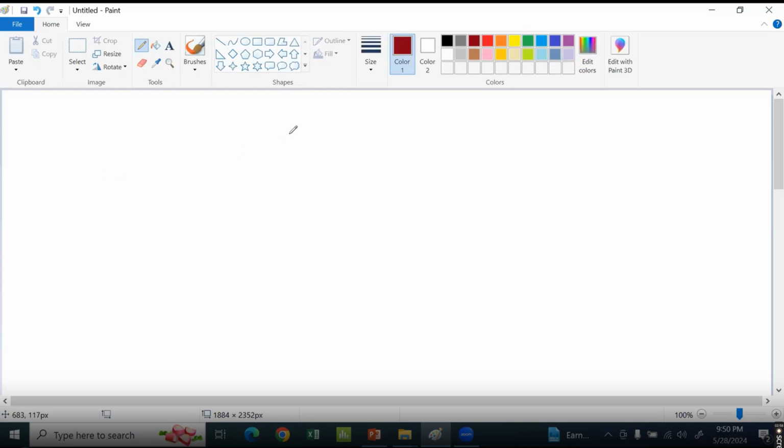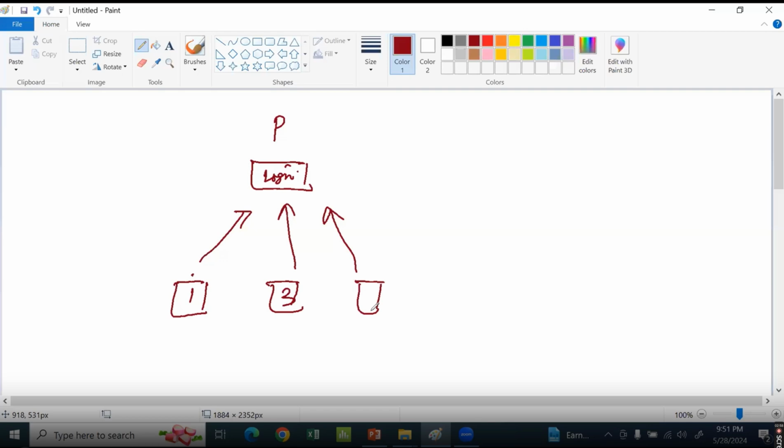So here, Manoj, you were talking about the product owner displaying a user story. This could be a forgot password, a login page, or something like that that has to be created. Generally, we expect the team to say this is a small user story, or a medium user story. Instead of saying it, they are showing the cards. Cards have numbers like 1 or 3 or 2. Instead of saying it verbally, you're showing cards. That's all that is happening. The conversation is replaced by cards which have Fibonacci numbers on them.